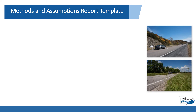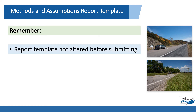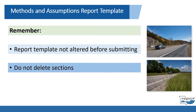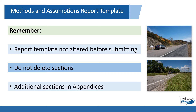MoDOT has developed a Methods and Assumptions report template meant to aid consultants and other parties submitting work to MoDOT. It is important that the report template is not altered before submitting to MoDOT. Do not delete any sections of the template. Instead, if a section does not apply to a given project, write N/A and give a brief explanation for why that section does not apply. If additional information is needed, it should be attached to the report as an appendix. The template provides several guidelines in color-coded text to represent information that should be replaced with project-specific information, section explanations, and content examples.